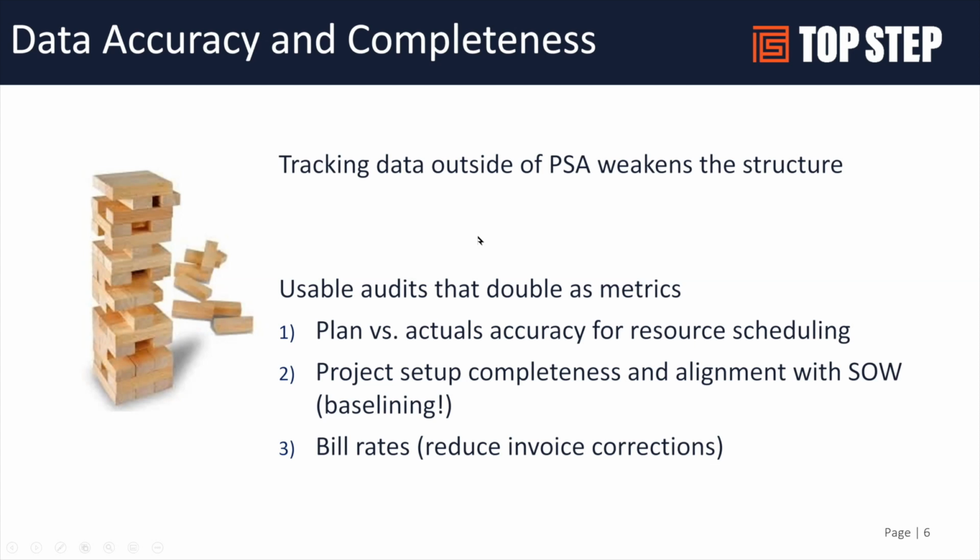Are we billing accurately? This can be a big customer satisfaction issue, and it could be a big problem that takes a lot of time to solve. Making sure that your project is set up with the correct billing rates, we don't want the customer coming back to us saying you billed me incorrectly. That's never a good thing. So spending the time upfront, auditing the billing scenarios, billing rules against the SOWs, is a critical part of overall project setup that will pay dividends downstream.